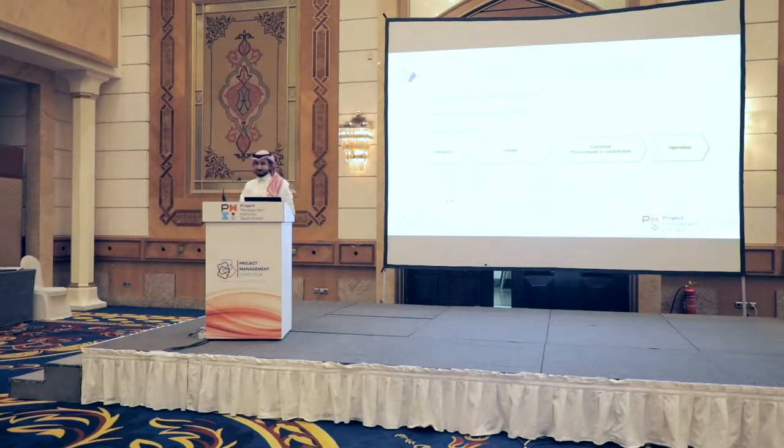Once the BIM execution plan is approved, the consultants continue developing the model as per the BIM execution plan until completion. The completed model was then submitted to us to be shared with the executing contractor during the build period for them to utilize it for construction. The following slides will explain to you the design process.